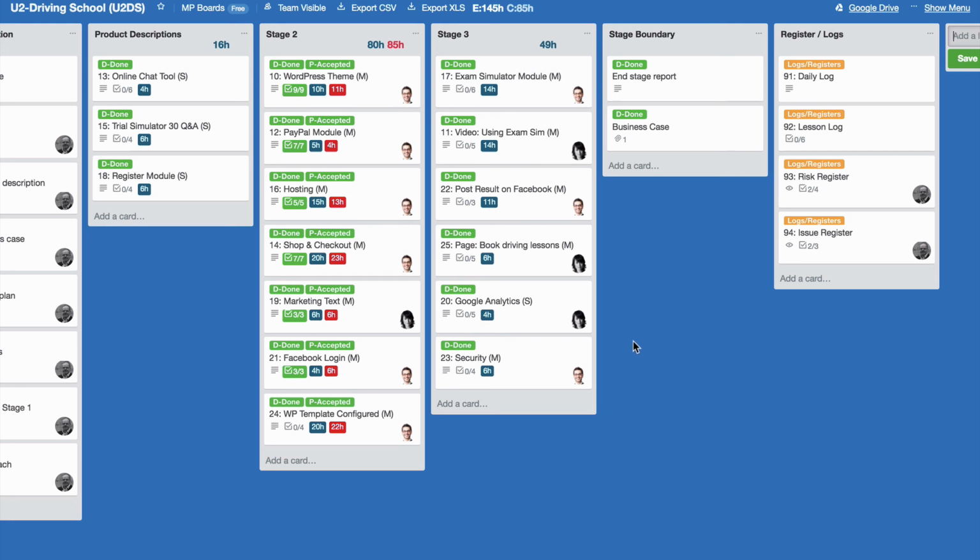That's our planning. So now we can go back to the project board with this list and say, that's our plan for stage 3. Here's our end stage report. Here's an update of the business case, and can we continue with the project? And if they allow us to go through, which they will in this case, then we can proceed with creating these products here.